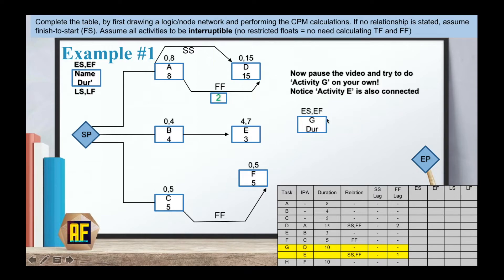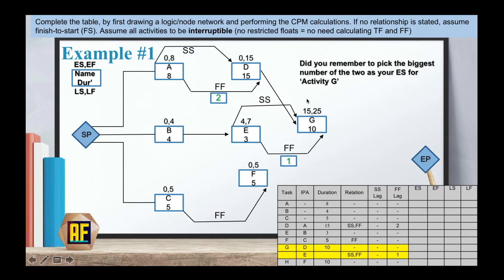Moving on to activity G. I want you to pause the video and try to do activity G on your own. Notice activity E is also connected. In activity G, it's coming from D and E with a duration of 10 days. From activity E, it has a start to start and a finish to finish relationship and one lag, which is pretty similar to what we did in D. So here is our answer. I hope that for your early start, you picked 15. If we have an IPA of two activities, we need to pick the bigger number of the two for our early start. We picked 15. Fifteen plus 10 is 25. Twenty-five is bigger than 7, we met our condition. Fifteen is bigger than 4, so we don't have a problem. And with the lag, 25 is much bigger than 3 plus 1, so we also don't have a problem.